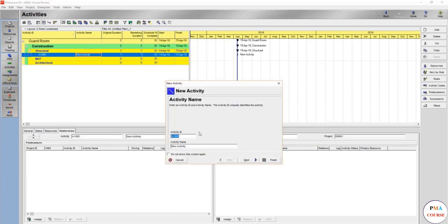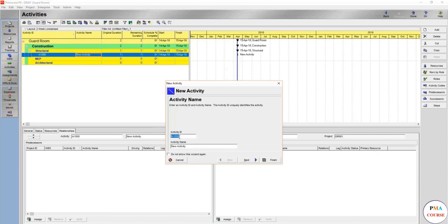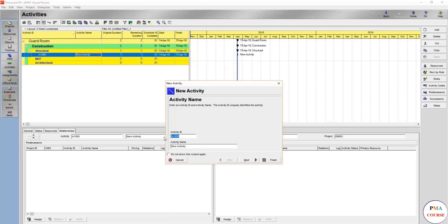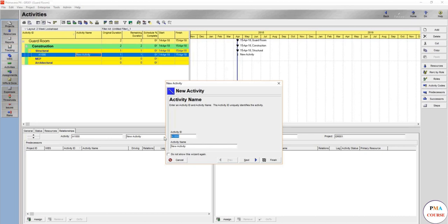So now a new activity wizard appears. You can also remove this by using the admin preferences, you can skip this, or you can just use it to remind you to use which activity ID and the activity name. You can assign everything here, but especially I have a lot of recommendations according to the project and the complexity of the project. But you always want to make sure that you can read the activity and understand everything about the activity from the activity ID. Let's say as much as possible, because as complex the project goes it would be harder, but at least you would have a very good estimate for where the activity is and what is the activity - at least in which main package. Is it low current, is it electrical, is it where?